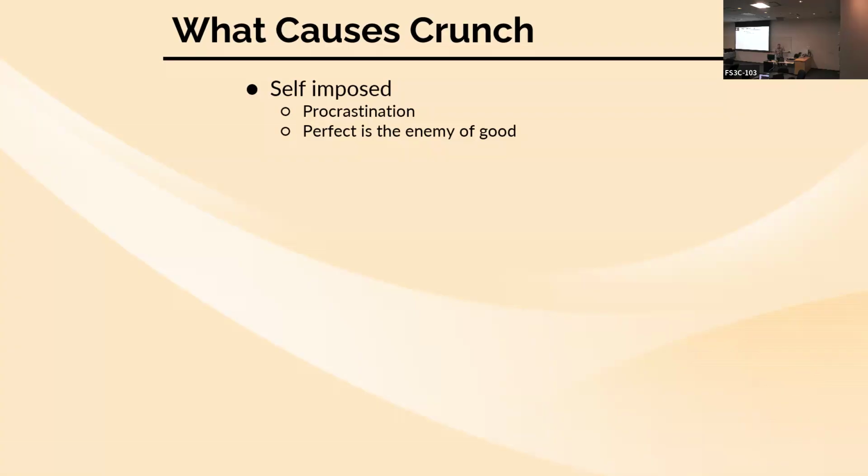You estimated it was going to take you 3 hours to get done. You've been working on it for 40, this whole time, and it's amazing now. And that's awesome that you have that amazing part of your game, but you also have all these other tasks you didn't get to yet. Now we don't have the boss battle. Now we don't have the inventory. Now we don't have the quest system. You might have this one amazing part, but we don't have everything else.